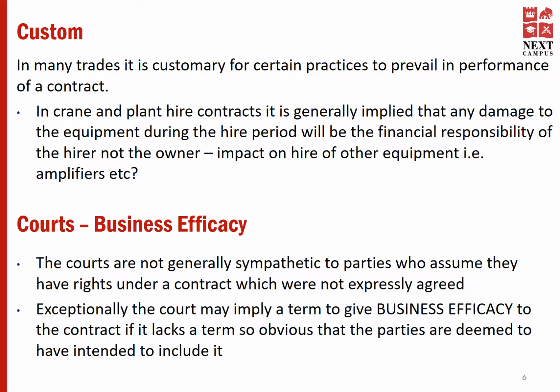Also, exceptionally, the court may imply a term to give business efficacy to the contract if it lacks a term so obvious that the parties are deemed to have intended to include it. So, under implied terms, we learned three main points, and they are statute, custom, and codes.